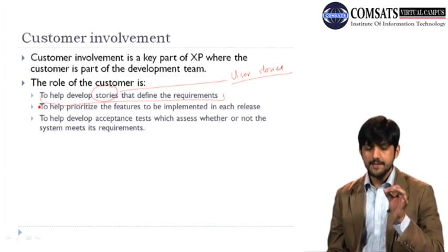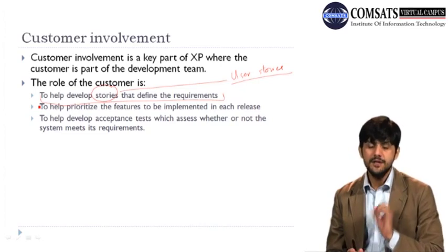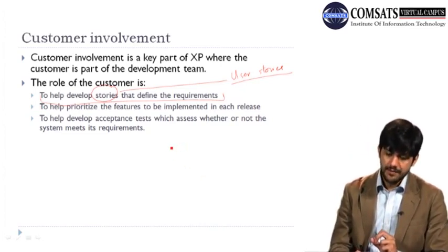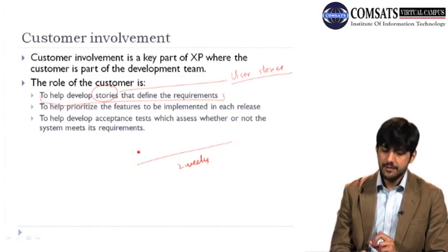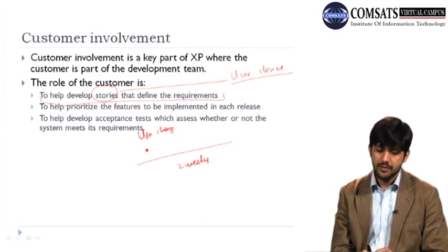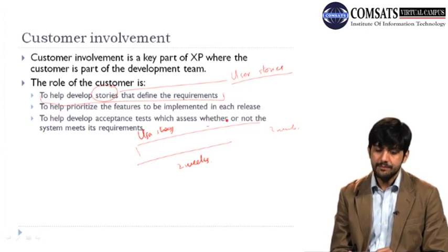This is important. We are not saying that you prioritize these user stories, but that you prioritize these features, because I mentioned that the maximum size of an increment is 2 weeks. If there is a user story, and you start planning it, and then you realize this is actually going to take 3 weeks to build, you will decompose it.